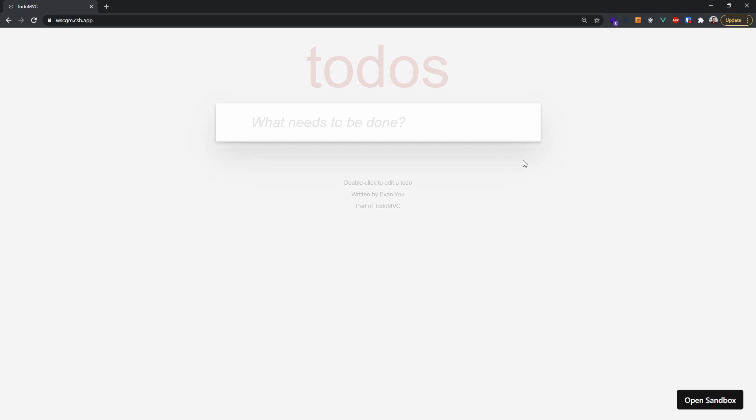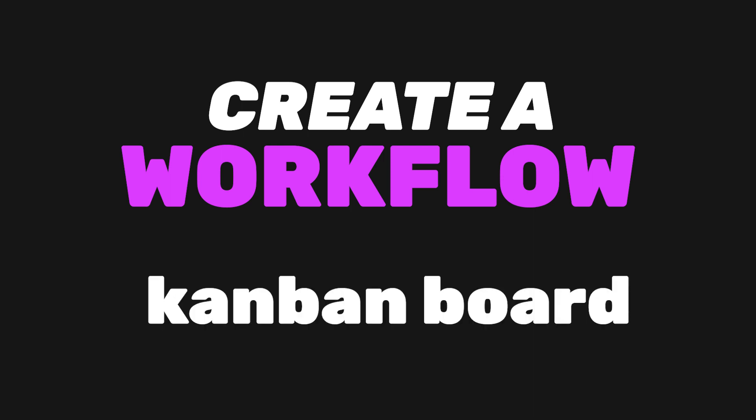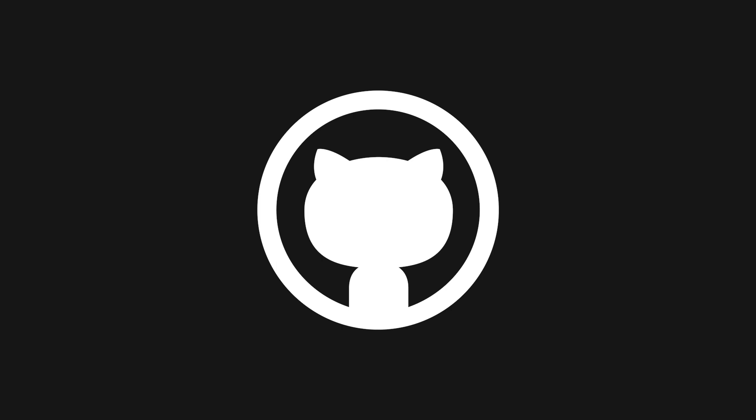The next step is the easiest, and it can be used in future projects, and that is to create a workflow. You can use Trello or GitHub, which are free tools to help you manage projects and they let you create something called a Kanban board. We'll take a look at GitHub's project management to show you how you can use this tool.